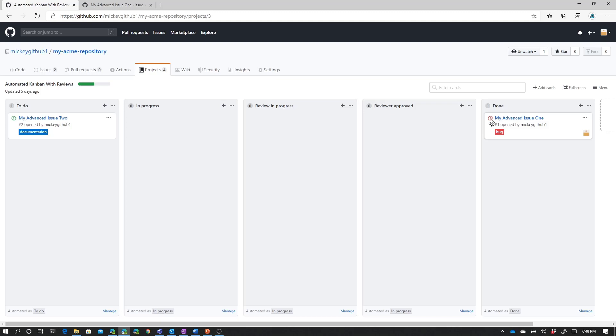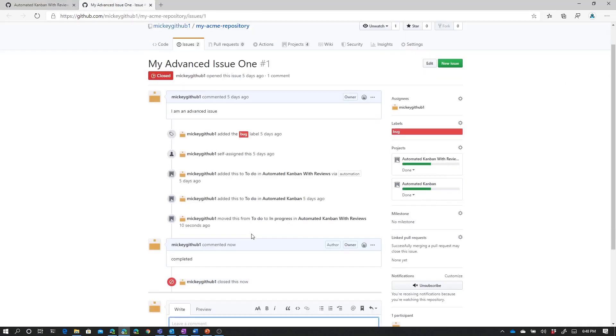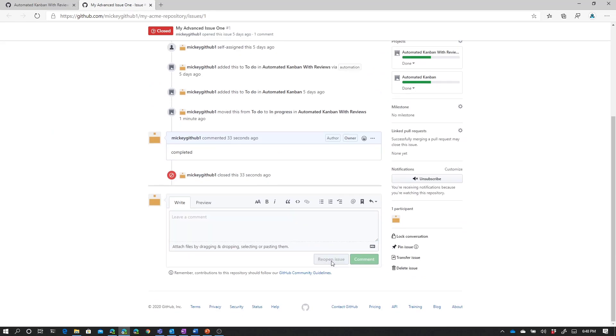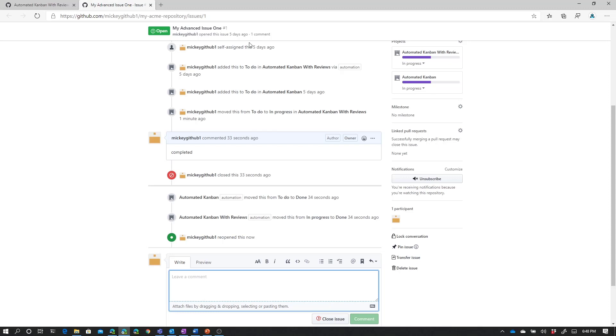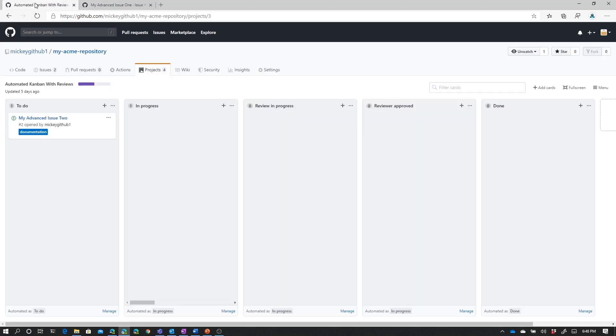And if I come back to this issue and I reopen it, you'll see the issue has changed to green. If we look at our progress now, we go back to one to-do and one in-progress. And if we look at our board, the issue moves back to the in-progress column because the automation is set up that any reopened issues automatically show up in the in-progress column.